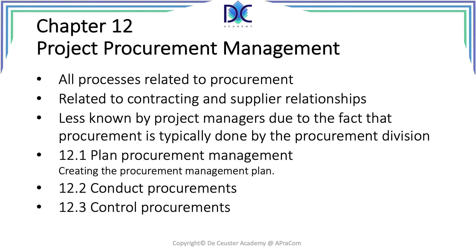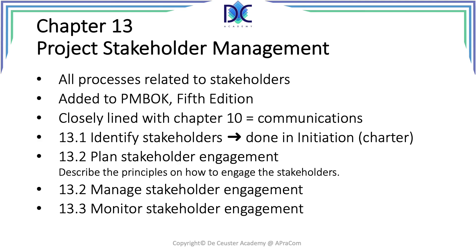Stakeholder management is very important — it was added in the fifth edition and is closely linked with communications. We start by identifying stakeholders, then plan stakeholder engagement, determine how we can engage them and what elements we will use, manage stakeholder engagement, and also monitor stakeholder engagement.